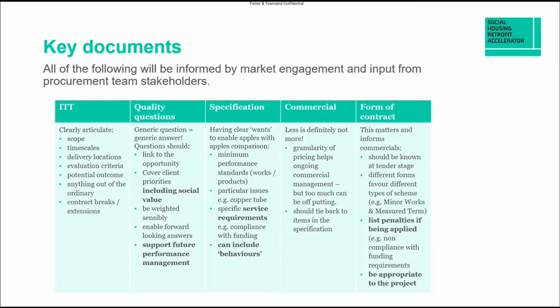Right, getting it right. So again, this just reiterates everything that we said before. So I won't go through this with any real effort, with the exception of number 7, I think. And this is useful to challenge yourselves. So, be realistic with yourselves. Can you deliver what you want to deliver in terms of the procurement process in the time that you've allocated? What happens if there's a delay? What if 2 of your procurement team go on holiday halfway through? We really need to be aware of the timescales that we are putting into our procurement processes, and being aware equally that there are hiccups from time to time. So yeah, number 7, be realistic.